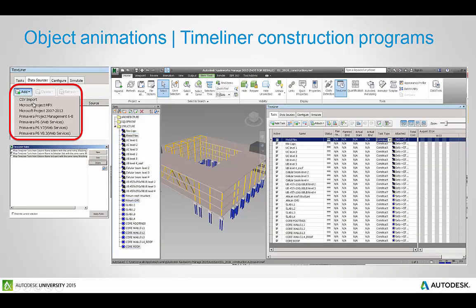To bring in the data you can actually do this manually inside the product but it's best to bring in your own construction program that you've made in an application like Microsoft Project or Excel saved as a CSV, or you could use Primavera.